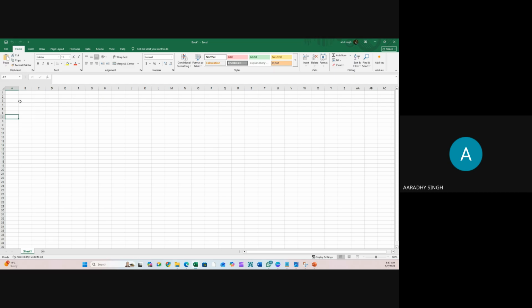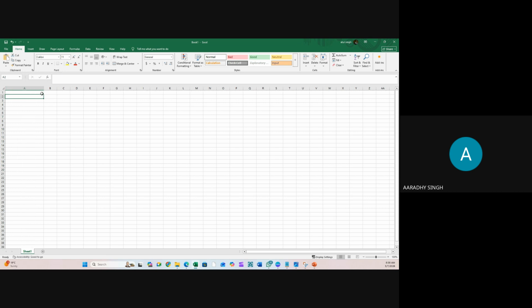The second is that for planning and project management, you need not buy new software, meaning you need not buy Jira. By default, Jira-type software is available here, called Azure DevOps Boards. In Azure DevOps Boards, we have 4 types of work items available. The biggest level entity is called the epic. So guys, under one epic, you can create multiple features.